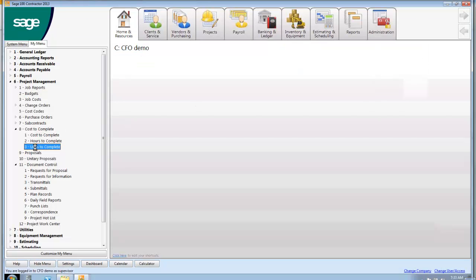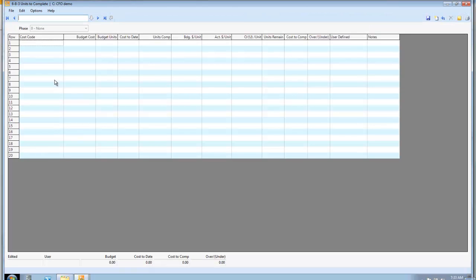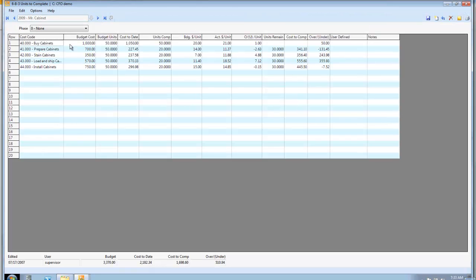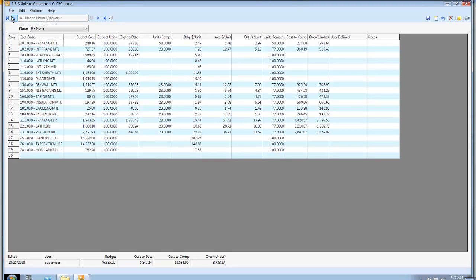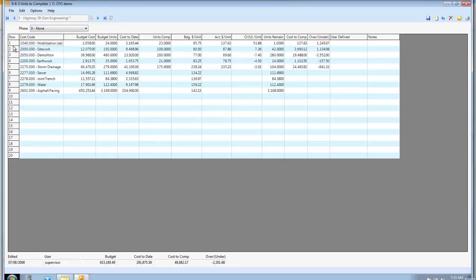The other one, and I'm a concrete guy, and I like unit cost only because it's the way I did it for 20 years. So I'm just going to use an example here. I'll go to line number 2. And so we budgeted $12,000, which you should have that number from your Excel or wherever how you're estimating today. I have some number of units. It could be number of welds. It could be number of feet. I don't care as long as it's measurable.